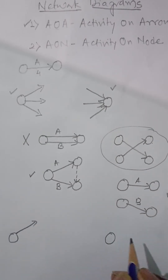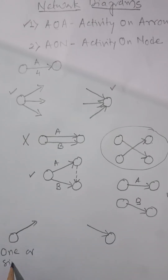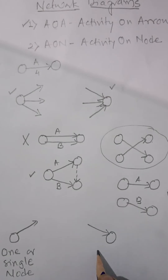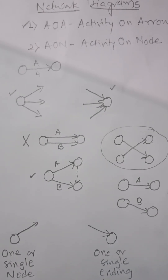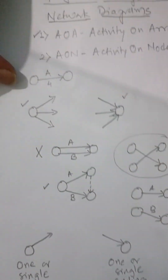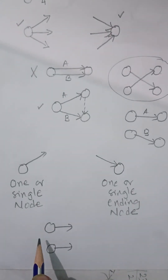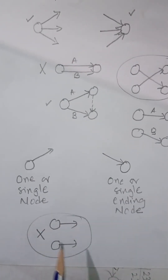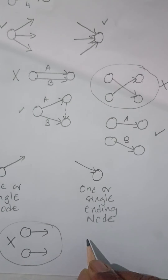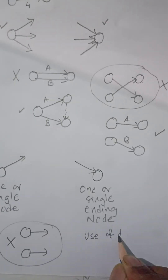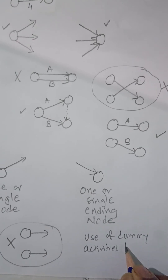Every project must have one single starting node, and the entire project must also end in one single node. You should not have two different starts for a project — this is not acceptable. Additionally, the use of dummy activities should be minimized; use them only when forced to.